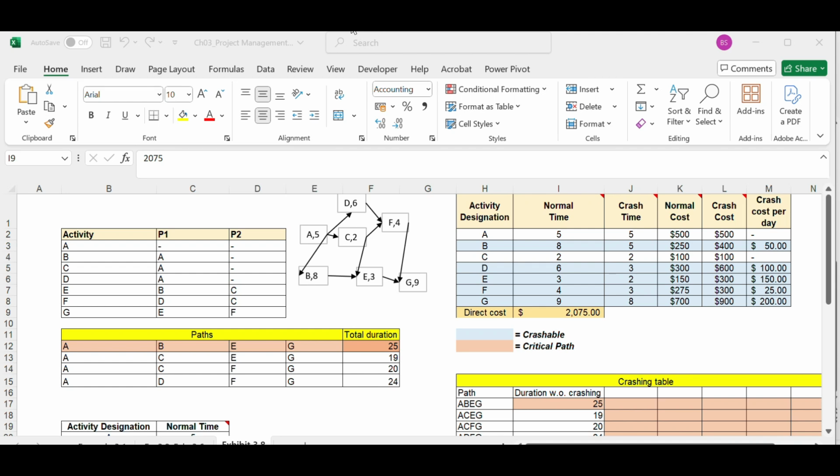After that, we need to make a staffing management plan, schedule the resources, and assign the resources. When we talk about scheduling resources, we have to plan the resources with respect to the requirement. One third of the time in project management goes to resourcing challenges. There are two types of resourcing challenges. One is the availability challenge, which is a matter of utilization. Another is the adequacy challenge. Adequacy challenge is due to the fact that the resources we allocated are not adequate.